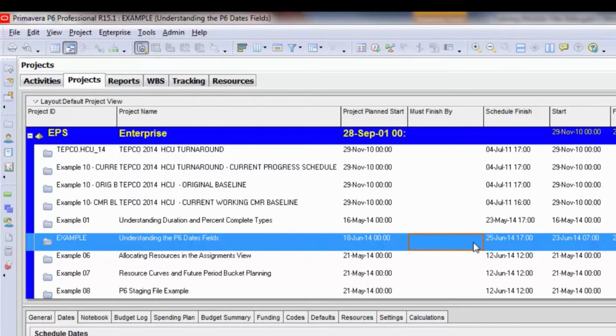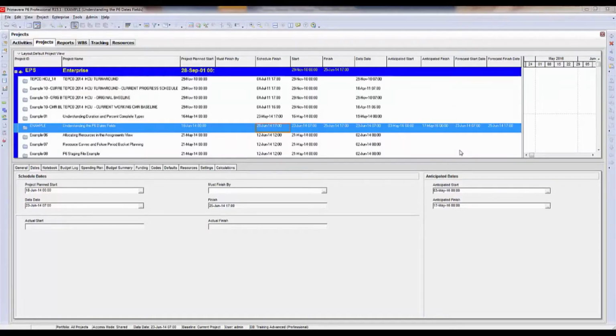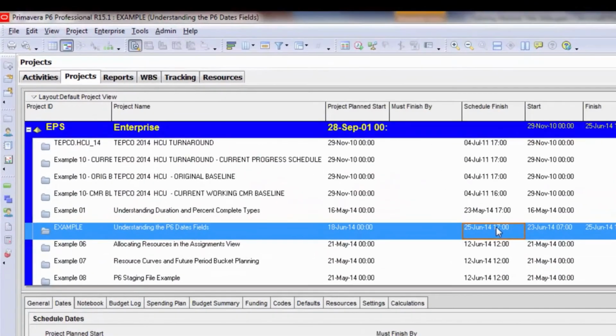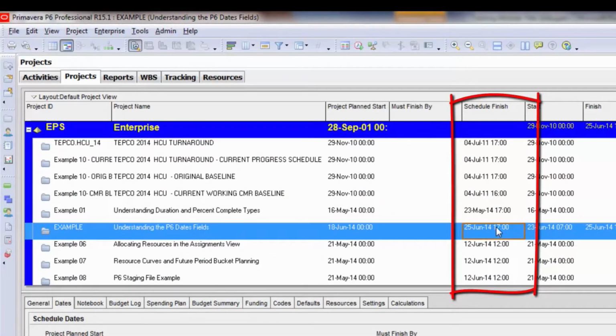If we follow the general definition of a project where we have a defined start and a defined finish, it's good to set up a start milestone for your project and a finish milestone for the project and then manage the constraints off of that. All of your activities should eventually, through the activity networks, feed into that final finish milestone so you can call the project complete. The schedule finish field defines the early finish date of the last activity in your schedule.